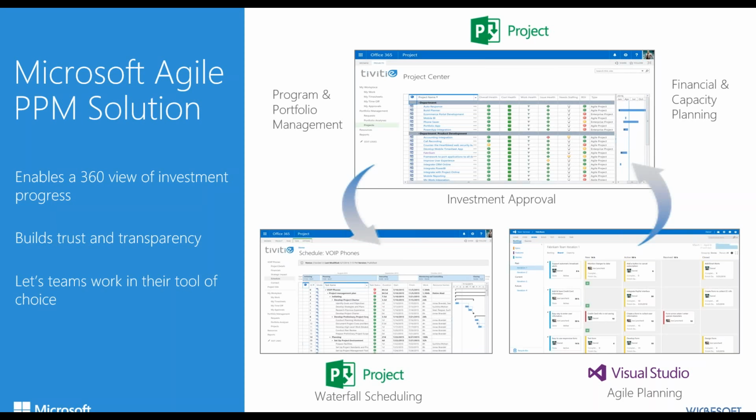And in this case, Project Online at the top really is, as we said before, the program and portfolio management solution, the place for intake and investment approval and business cases, financial and capacity planning, etc. But then when it comes time to execute, Microsoft's One Connect allows you to just say, I want to plan this in Visual Studio Team Services, and you can go out and then execute on that in an agile fashion and have the relevant data feed seamlessly back into Project Online. And we'll show you that in action.